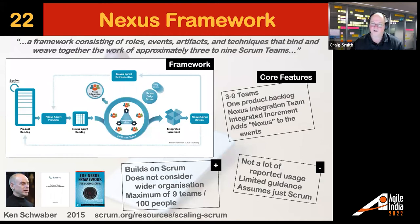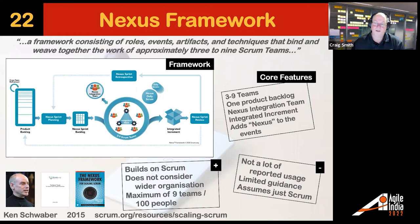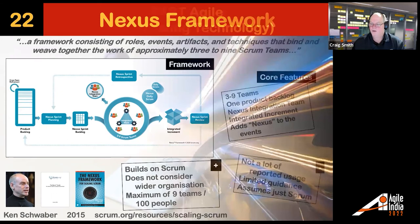The Nexus Framework has been around for a while — Jeff Sutherland was on Scrum at Scale, Ken Schwaber was on this one, about the same time. If you read the diagram, it looks exactly like the Scrum process; all they've done is put the word 'Nexus' in front of everything: Nexus Sprint Backlog, Nexus Integration Team, Nexus Daily Scrum, Nexus Sprint Review. The idea is a team-of-teams approach where your team and all other teams get together in a combined process. Not a lot of usage in my travels, but if you're looking for somewhere to start, it's worth a look.